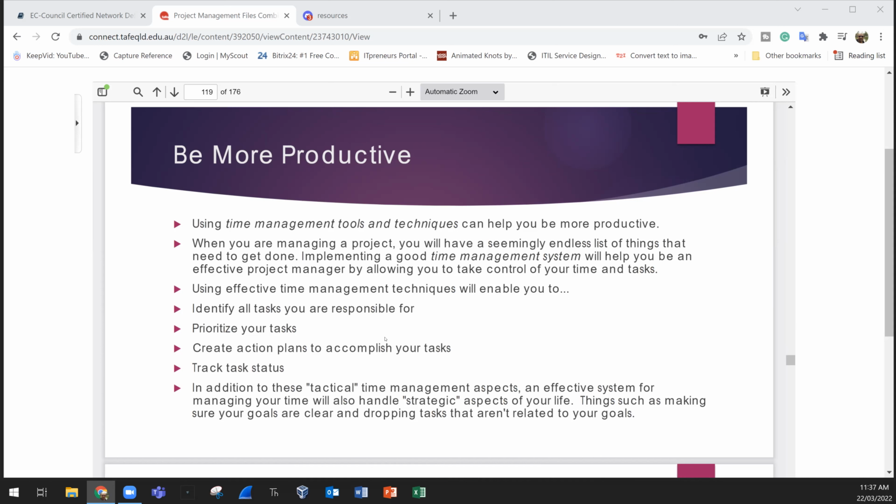Then you track that. You track the time, and as we mentioned, you need to give extra time during the planning phase as contingency. Maybe something happened. Sometimes in different organizations, we have a fire drill, so we need to evacuate the place. Then this will take half an hour or 1 hour.